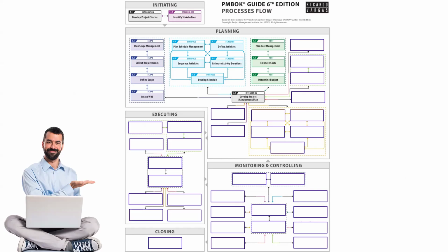Okay, I understand. During the life of the project, when you have done the planning and you are even executing and monitoring and controlling the project, you are supposed to keep updating the business case. And if at any stage you realize that the business case is no more valid due to changing environment and circumstances, you may recommend the project be closed down immediately. Do people know this? Definitely not. I work with so many different business units and they never do this.